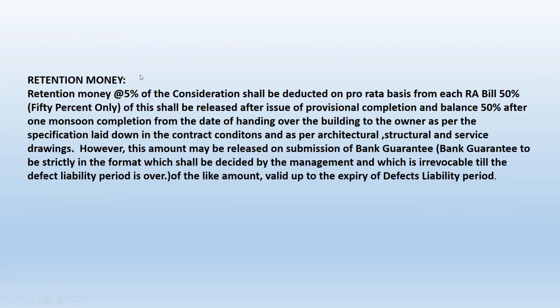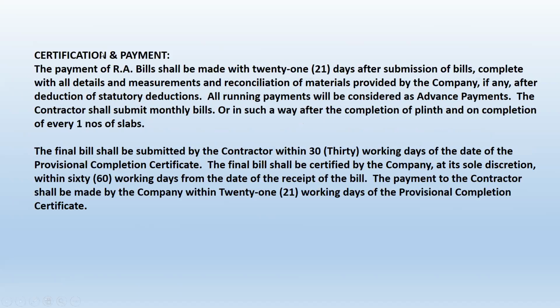First, there should be a retention money. In that itself, we have to very clearly mention how the retention money is going to be released. Let us say 50% on virtual completion, 50% after the deferred liability period, etc. These are the things you have to mention.